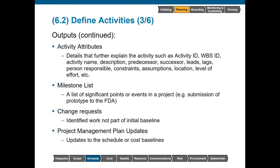With change requests, anytime we do a change request that is not part of the initial baseline, it will go through the perform integrated change control process. And finally we have our project management plan updates. Anytime we need to update the schedule or cost baselines, that will be part of the overall project management plan since the baselines are part of your project management plan.